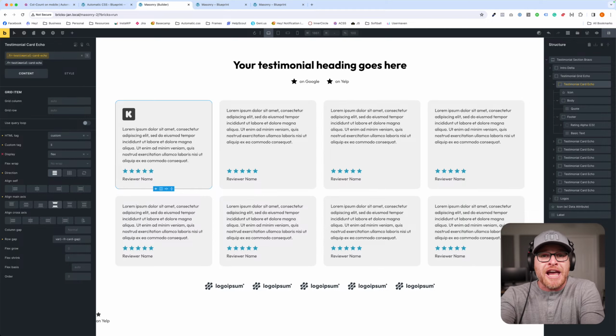We give what's called a change order, and we say, here is the official change, right? You already greenlit something. Now there's got to be an official change. Here's the change order. Here's the price for the change. We're not doing this for the same price that we agreed to earlier. That work's already been done, right? This is new work. So change order, and here's what it's gonna do to the timeline, and they sign it, right? So they say, yes, we are changing things, and we understand that this is a cost, and we understand that this is going to do something to the timeline that we cannot complain about later, because they will. Absolutely. Try to complain about it later.